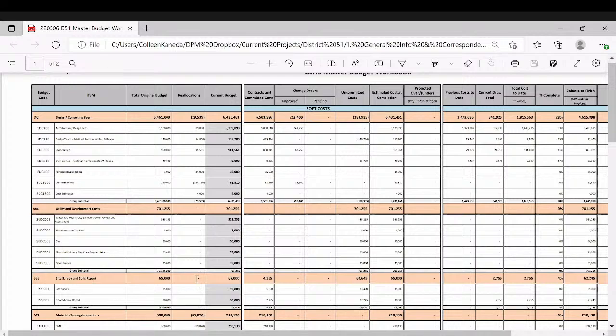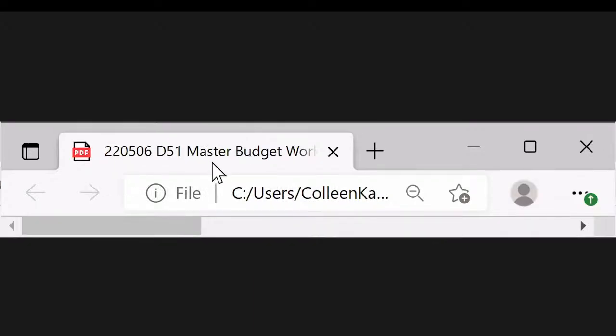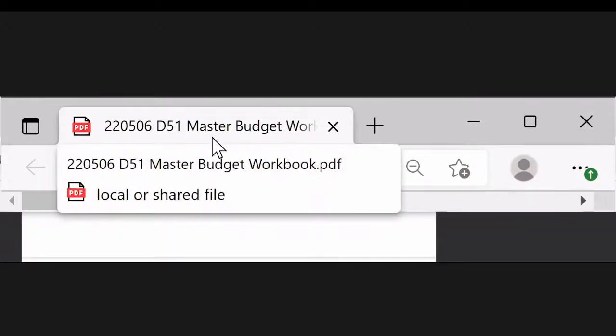It's a good question. I would say historically, we don't have any risk once we sign the GMP. Now we're in unprecedented times. There might be a couple things that come up where a supplier has some sort of very over-standard increase, and we ask for them to come to us with all of the information from that supplier, or the sub needs to provide that with a lot of backup, and we can evaluate what's fair and reasonable here, because of the markets we're going through, unlike anything that we've ever seen. But in general, that risk transfers to them. Right. Yeah.